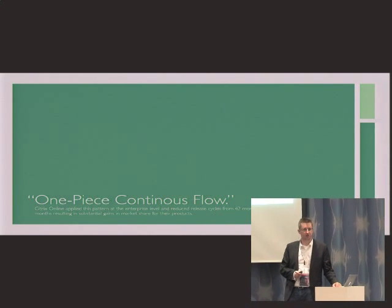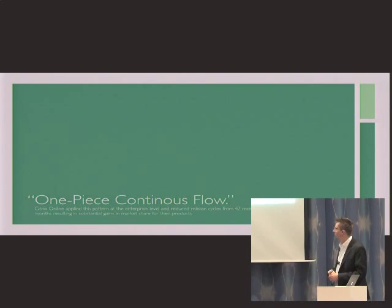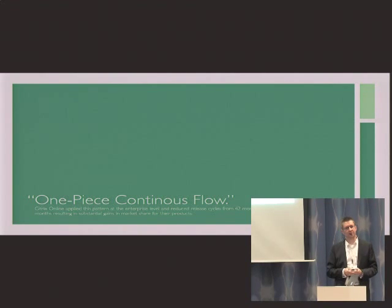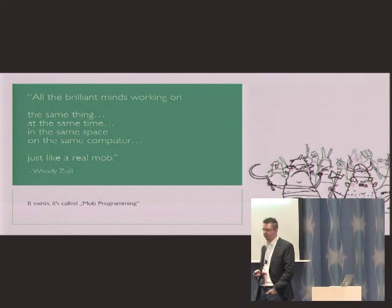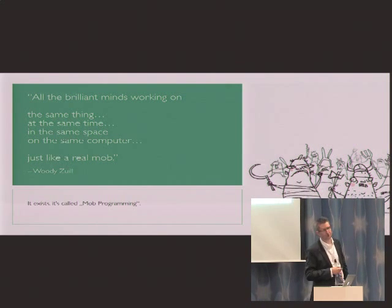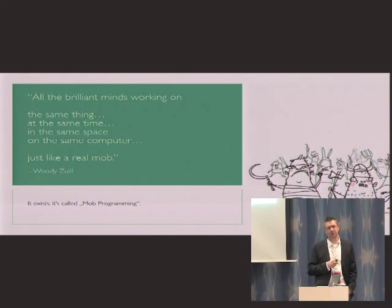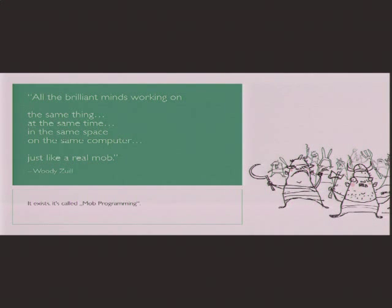It's called one piece continuous flow. Some would call it the uber Kanban. Citrix did it on the enterprise level for their portfolio management program. They came down from 42-month cycle time to 10-month cycle time. If you're sitting together, let's try mob programming. That's all people sitting in one room with one computer, five developers working on one keyboard. It's actually very funny, looks very good, and it's extremely efficient. It's totally counterintuitive to have five people, but in the end you're getting the right code and nothing more, and it works.